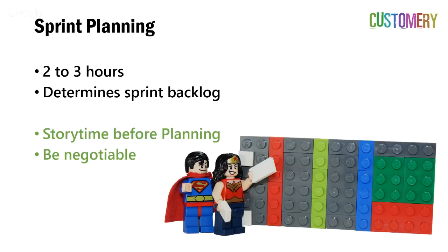Mature teams will have a practice of paying down what's known as technical debt. Technical debt is those features that you've implemented that when you look back on, there's a better way of doing it. It might be code that needs to be refactored, or it might be a feature and you go, oh, I wish we'd done it differently. Sometimes the team needs to be trusted by the product owner to be given enough time to go away and reduce that technical debt. By reducing technical debt, we keep the system at its optimum state, and we reduce the complexity of the system to make it easier to maintain and support and enhance in the future.